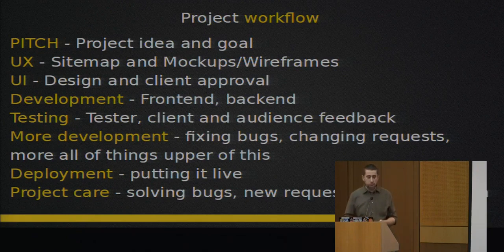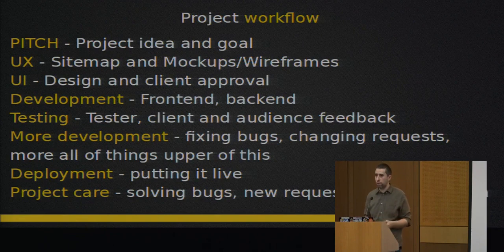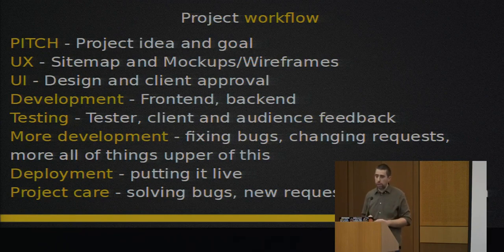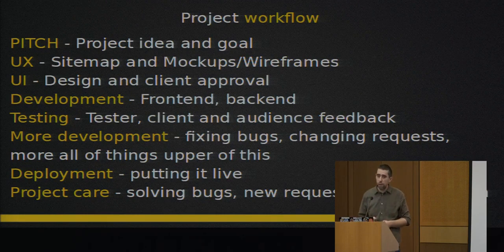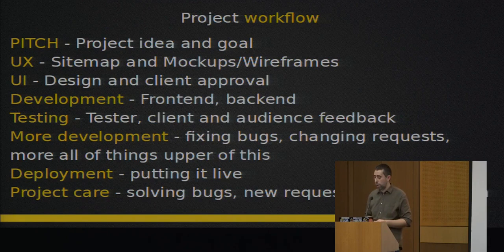There's testing that can involve the client and maybe audience feedback, depending on the project. The client may involve potential audience in that. After feedback from testing is received, there's more development because there will always be some bugs, change requests, and other things. Once done with that, it's time to put the project live. After that, if all is okay, you'll fortunately start a project care program for clients — solving bugs, new requests, administration of the project, et cetera — if the client gives you the green light.